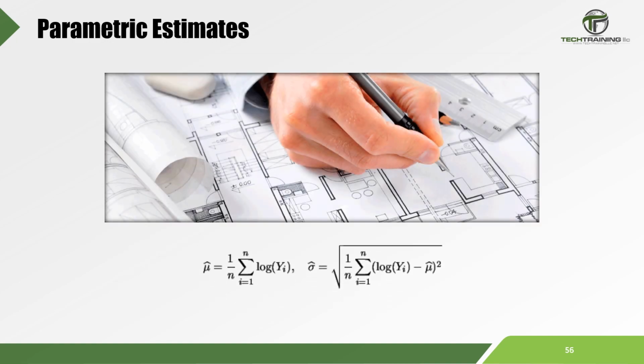Parametric estimates, though similar to square foot estimates, are more complex. Parametric estimates use log functions, ratios of parameters, multiplication of parameters, and in some cases even more complicated equations.